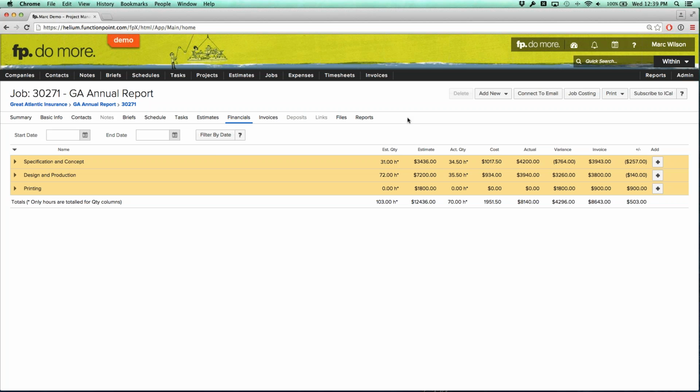And then they call you up two weeks later and say, actually, we need some additional work done on this. All I would recommend doing is opening the job back up, tracking your time against it, and billing based on the time spent. The way that you categorize a job does not limit you from billing it in different ways at different times. You would just do more invoices on it later that would be based on actuals as opposed to estimated.